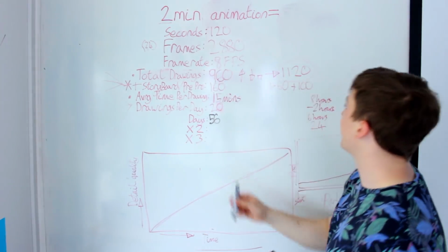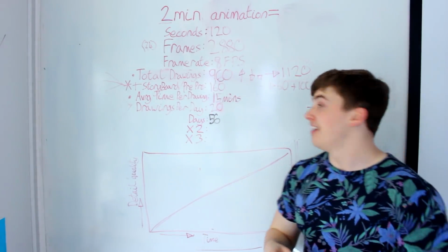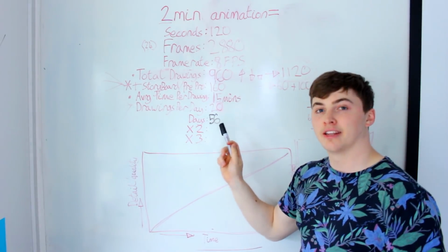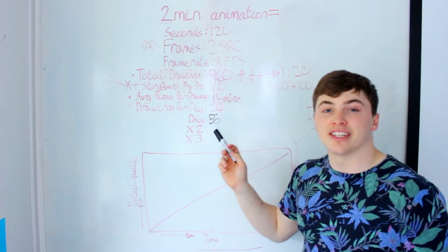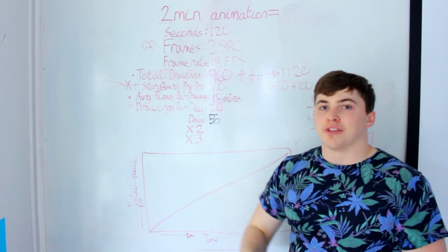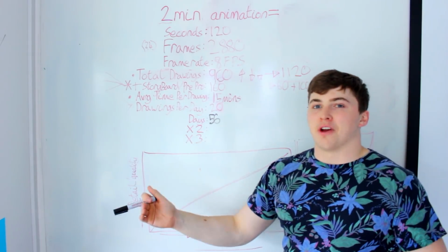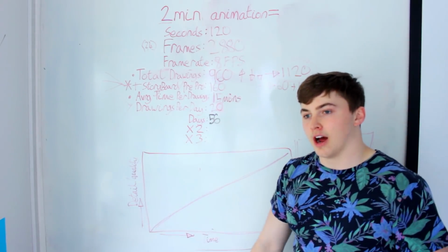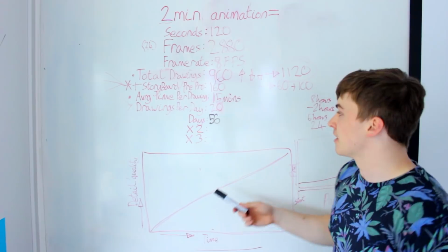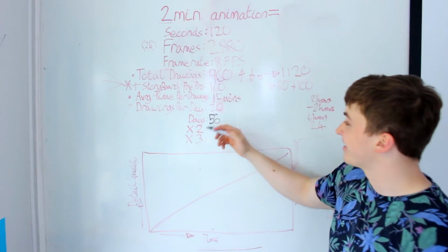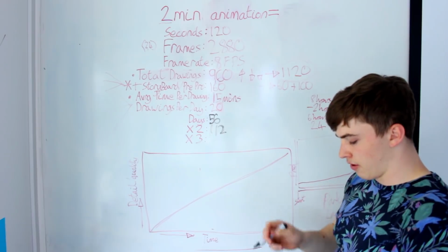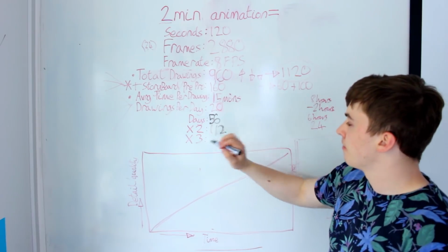So 56 days is the calculation. Now I look at that 56 days, I think that's a bit tight. You've got to work in contingency time, and contingency time is just all the stuff you don't see coming. Things in the calculations that we haven't thought of. There's a lot of things like that. An easy trick is just multiply it by 2, which gives 112, and then you've also got a multiplication by 3.